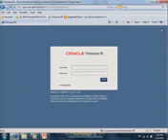Yes? Start and finish dating. Were those baseline or were those just computer generated? If they're not actualized, the dates that you're seeing in the start and finish columns are going to be your early dates. So they're calculated dates based on whatever logic you have built into the schedule and whatever the start of the project or the data date is. Is that what all the users will see? So if environmental is late, design is going to see a late PSPR date? Once the project is rescheduled, if the dates get pushed out, that's what you'll be seeing.